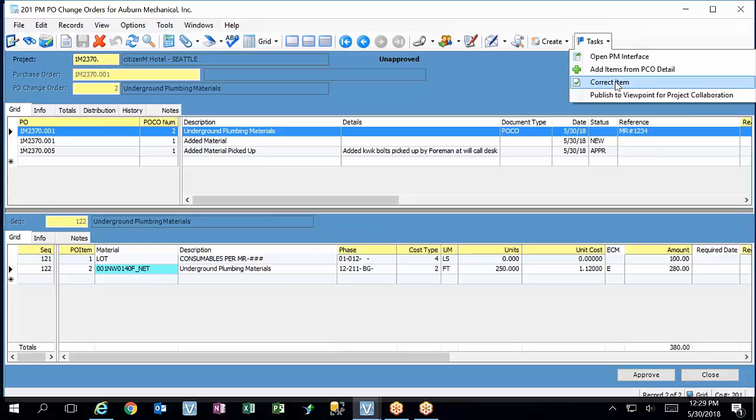And so you say, okay, well, we don't really know, we put this in here because we're probably going to need it, we're just not sure where. And so then when we'd write things, even just an initial subcontract, and we were using some of that, we would say we were going to use this particular phase, but then we have to move the money from this one up into there. Because we wanted to cost it to the right place, not to some contingency allowance, surplus kind of thing.